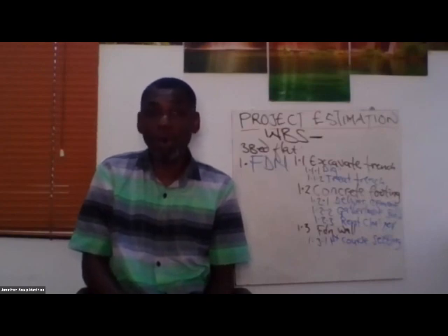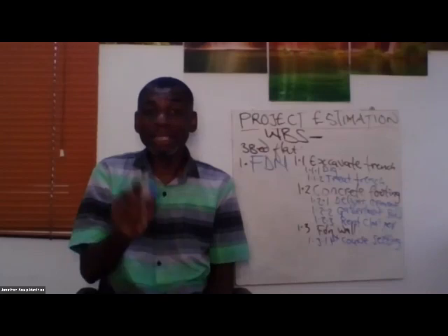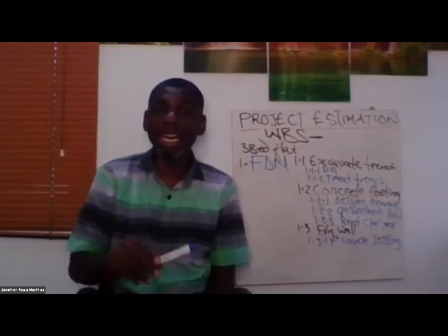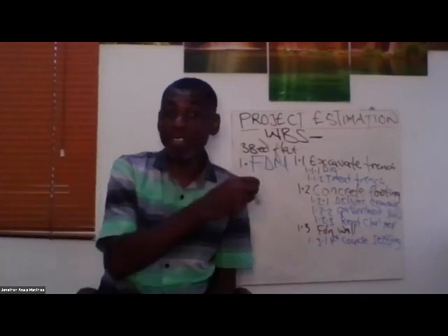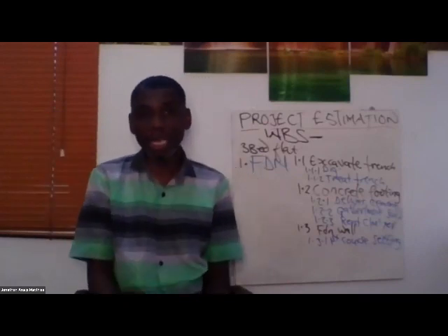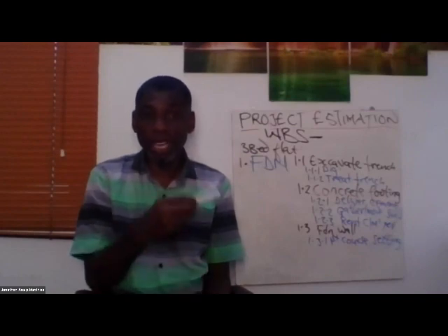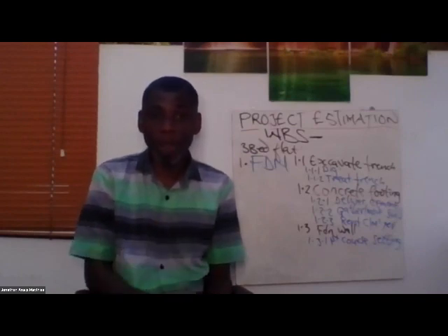You can actually use one whole day. And when you are estimating for this first course, don't estimate that the mason who told you he can do 300 blocks per day can also achieve the same thing in this first course. You may not be able to achieve it, right? So you need to factor that in. This first course is very important, so let me pay them more. If you are paying 40 naira, you may pay 45.